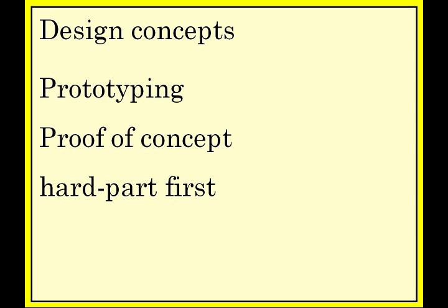If your project was to develop a website and you needed to, let's say, maintain inventory, and you know that the hard part is coming up with the data structure that will allow your front end to easily query the database and pull out all the information that you want. But instead of focusing on that first, you start drawing up what the user interface looks like. Because that's easy, and it might even be fun to you. Well, try to avoid that. Hard part first says, in design, you want to focus on those issues which you know are going to be difficult.